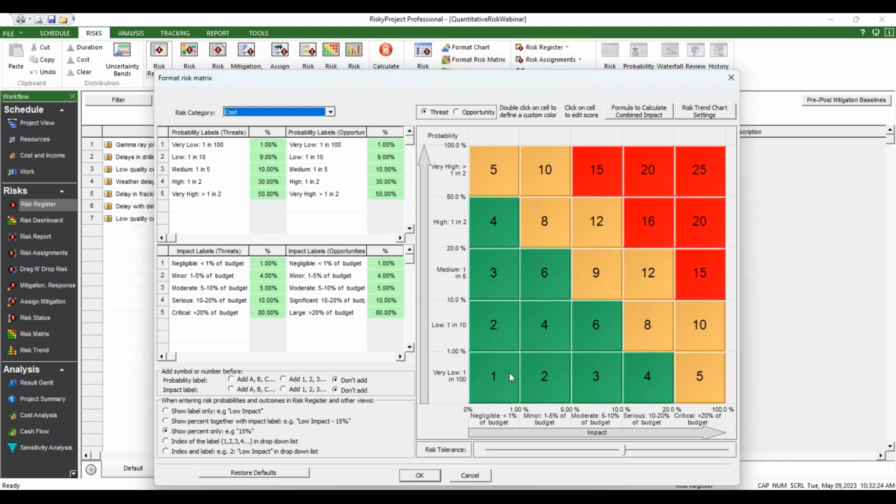So what I've done is I'm not going to say normalized, but I've modified the ranges so that it better reflects the reality when we're doing quantitative risk analysis. And you would do this if you have a requirement to use the risk matrix as one of your reporting tools. Because again, what would happen if we didn't do that? Most of our risks would cluster down here, and we don't get a really good assessment of the risks that way when we're doing quantitative risk analysis.